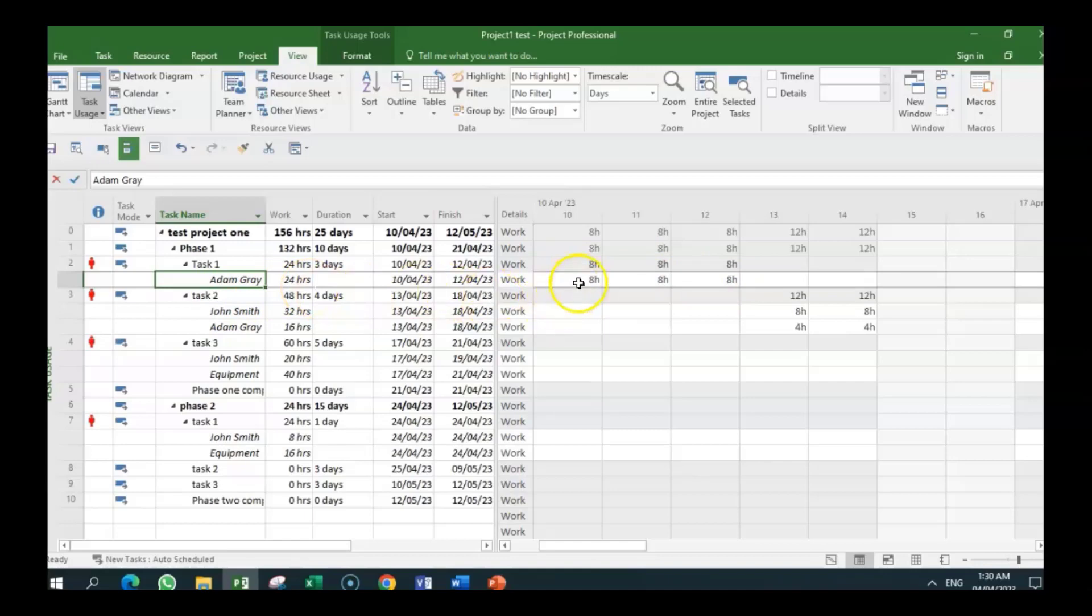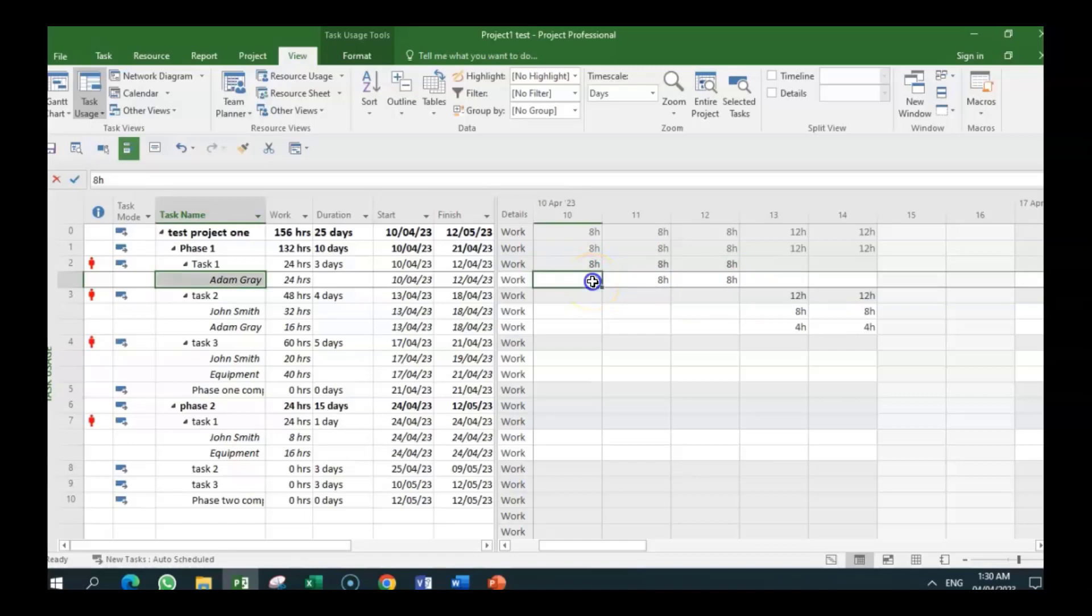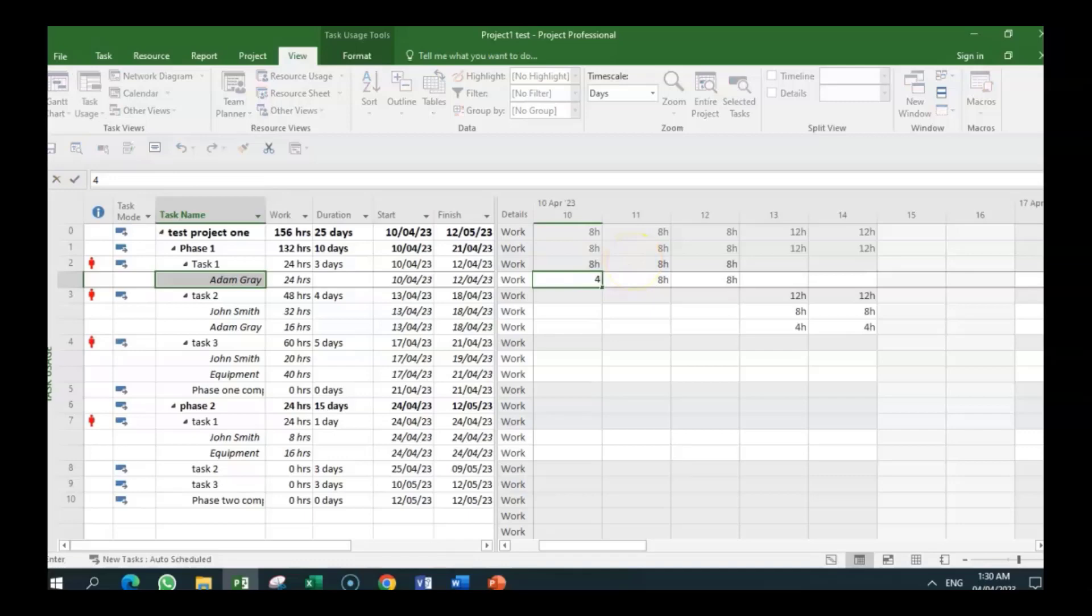But remember, he's only available to the project for four hours. So there is a way we can do an adjustment. We could do a manual adjustment. We can go in in this view, and we could change his time because we know he's only available for four hours. We can change his time. Now look, you will realize the over-allocation is still here. But if you put four hours here—